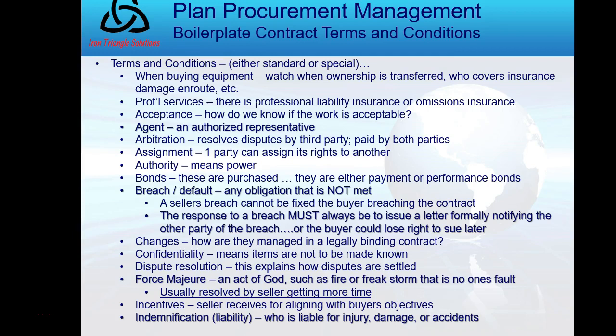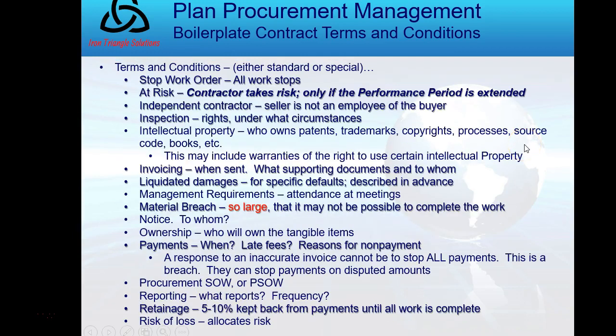Force majeure, towards the bottom. I didn't know what that meant. It meant French. I don't do French. Love the wine. Don't do the words. Anyhow, it's an act of God, such as a freak storm or a fire. And it's usually resolved, because it's no fault of the seller, by generally giving them more time upfront to resolve it. Indemnification. I never knew what that meant. It means liability. Who's liable for injury, damage, or accidents? At risk is another term.